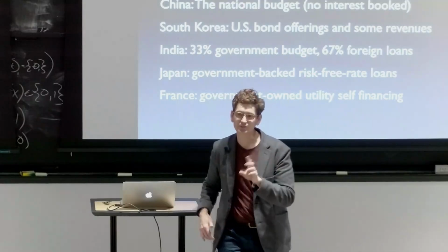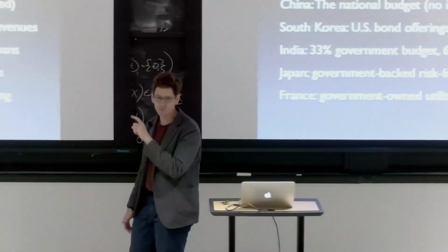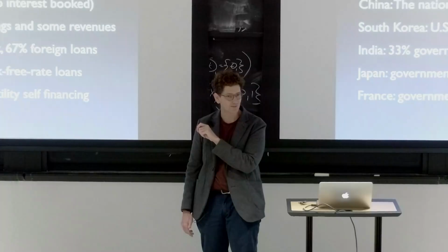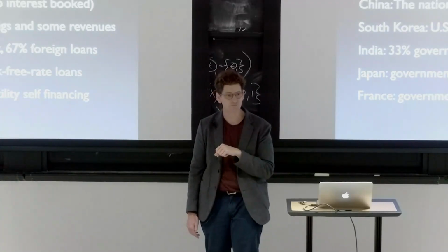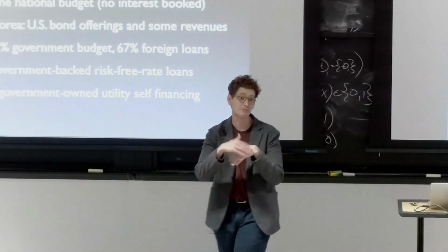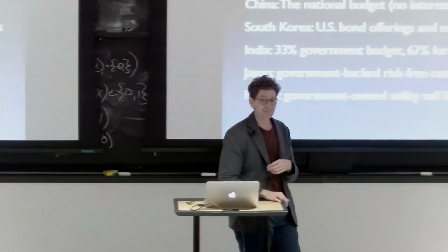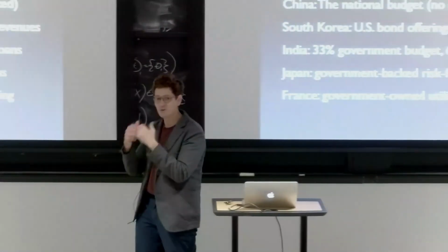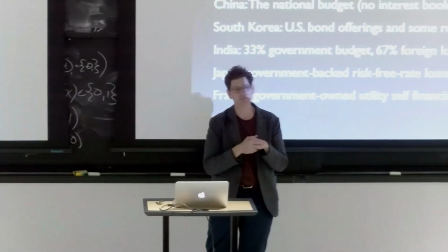So sometimes you will see a calculation of the overnight cost for Vogtle, and it will be smaller than the number that I show you at $19,000 per kilowatt of capacity. And the reason it's smaller is because they failed to take into account the details of that fund. So Professor Chevron has his own number, and then I talked to him about it. He's like, "Oh, really? They actually made money off the bond offer?" And I'm like, yeah, you have to add that back in just to find the true technical cost, right? So that's why that plant is so expensive, but also why it was able to be built. A remarkable moment in history where they could do that.